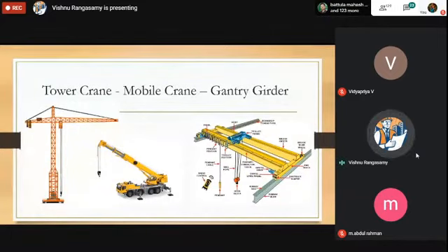But if you go for a rental, like we have timed projects, we must complete the project within 5 to 6 months. They give it for rental. So what is the rental amount we need to pay for 3 months? It is a periodical reference. For 3 months, the rental is around 2.5 lakhs, and the installation charges are around 90,000 to 120,000.